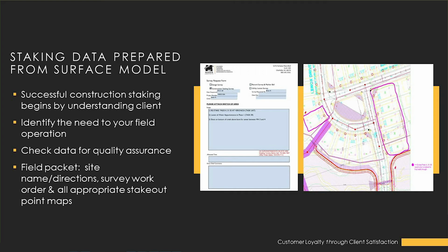Then with that work order, we're also providing point maps, which is critical. The point maps are highlighted in the areas that they're going to be working in for that day or that particular operation. Those are so critical. In my past, typically the call has come in at times: hey, I need you to run over to Project X, the contractor needs some grading stakes,